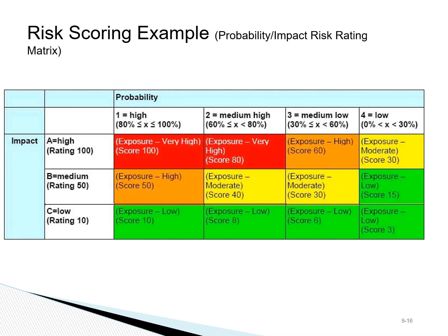We use this information to categorize risks. To categorize risks, we use a scoring approach. An example of this is on this slide from PMI. So you can see that in this risk scoring approach, risks are categorized in four major categories: very high, high, moderate, and low.